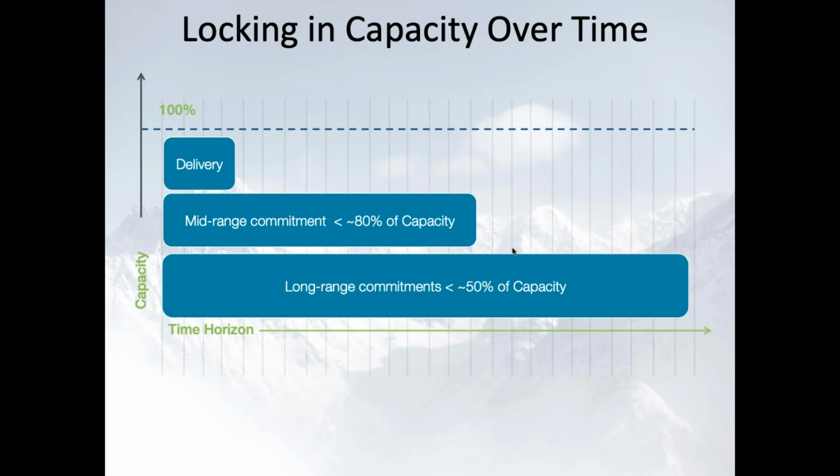If you make the shift from projects to products, what you want to be thinking about is what level of staffing do I need to assign to these different teams for the year based on what they're doing. And then at the quarterly basis, you're going to think about how do I shift capacity across these teams.